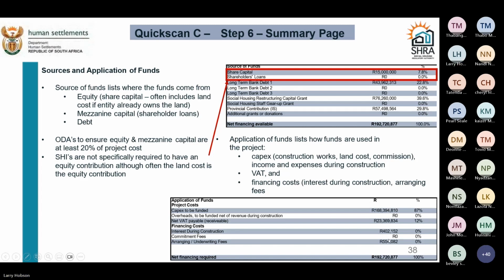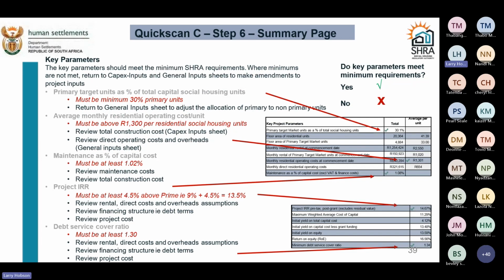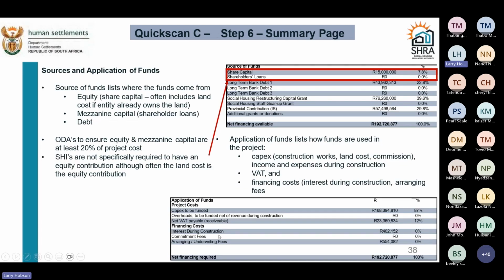Oh yes, I forgot about the interest, your capitalized interest during construction, that gets put into here, and any of your other upfront financing fees. So all those layers of fees that were in the finance section that we went through earlier, they would all come in here because they ultimately get capitalized to the value of the project.